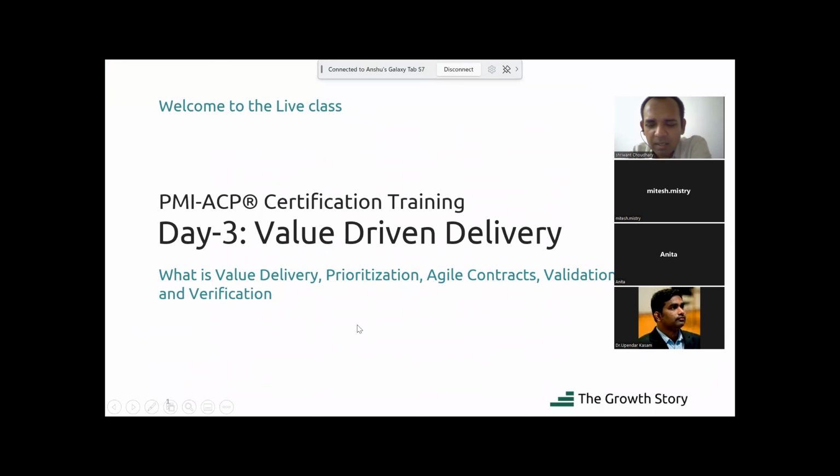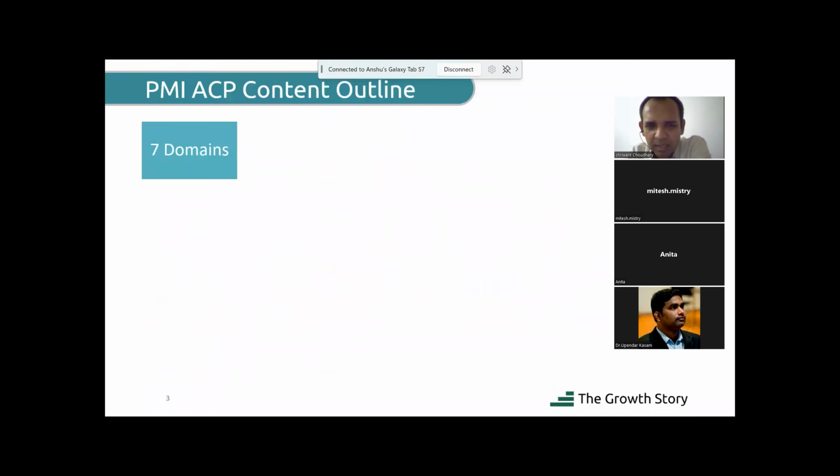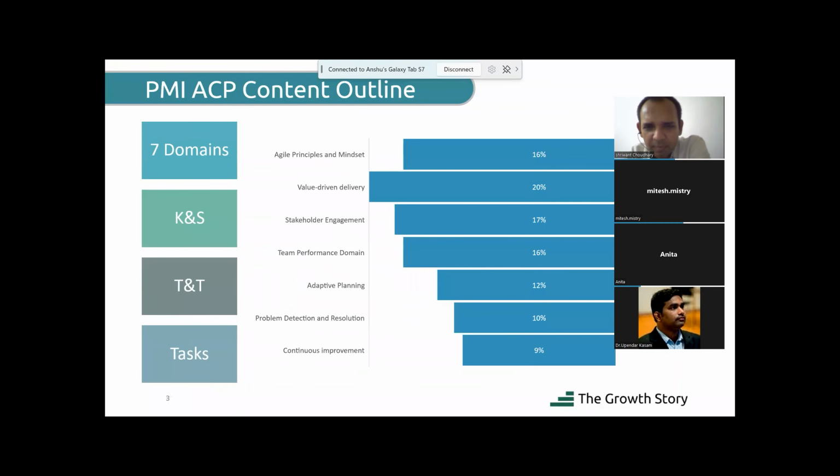To emphasize what we discussed now: maybe a feature has multiple user stories, and each user story has multiple tasks. If I completed 4 tasks, it means I successfully completed one user story. And if I completed 2-3 user stories, that is part of one feature completed. Is it correct? Yes. And in sprint planning, we are considering user stories, not tasks, right? Yes. We are converting the user stories into tasks.